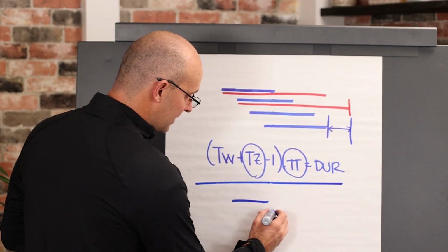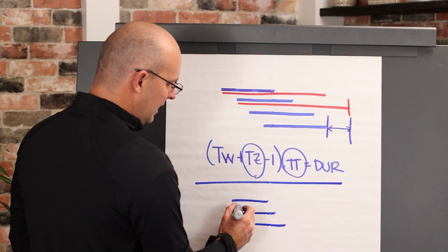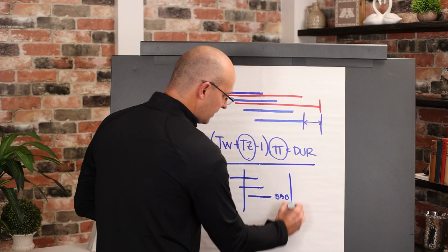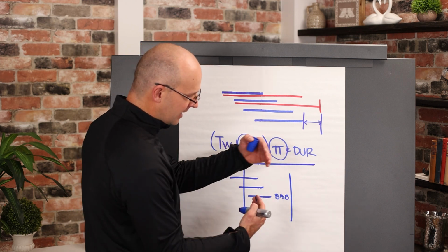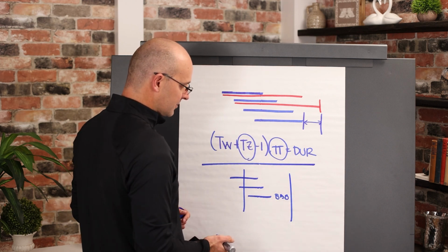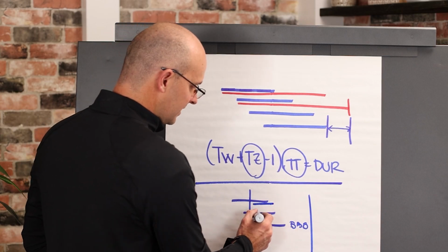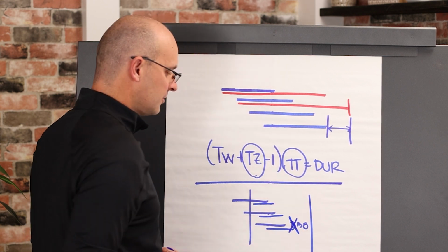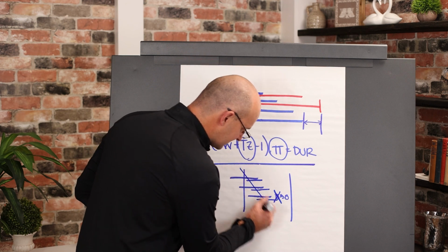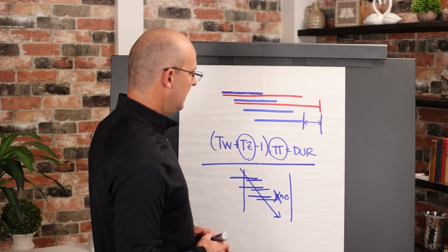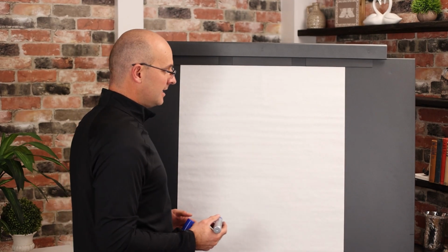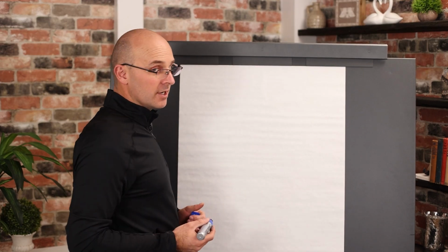Now, when you have a takt plan and you have an interruption, and you have buffers at the end, instead of moving the end date or stacking work, you just eat into those buffers. Literally, all of these activities might shift out and you'll use one of those buffer days, and now everybody can stay in a consistent flow. It's absolutely genius.